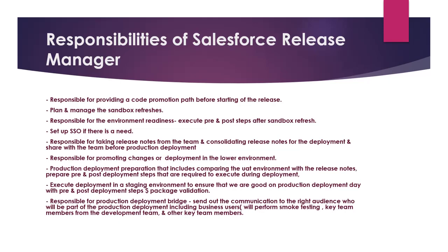And also, a release manager has to prepare pre and post deployment steps that are required to execute during deployment, and decide who will be the responsible person executing those steps during the deployment. Execution of the deployment in a staging environment is also done to ensure that we are good on production deployment day with the pre and post deployment steps.